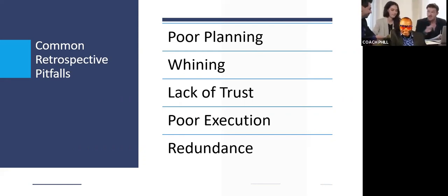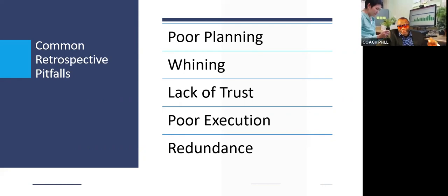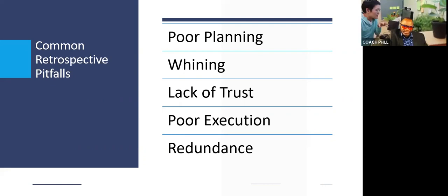The next one is redundancy. An effective retrospective should result in decisions and actions to take. If you have too many, people need direction on which ones to carry out. So you got to prioritize them, and that's the step just before pursuing the outcomes. It's so important to prioritize, because you get a bunch of issues, impediments, problems, things to resolve. You got to go for one, right? And that's why in time past, the Scrum guide would say one or two improvement ideas per iteration.